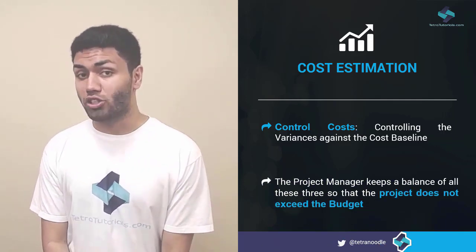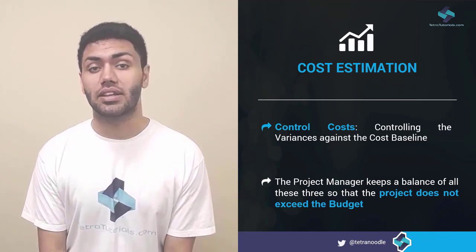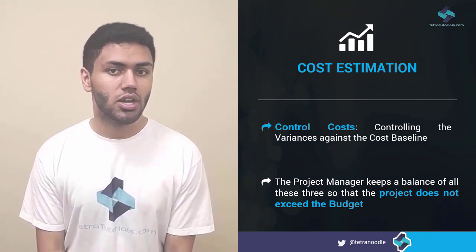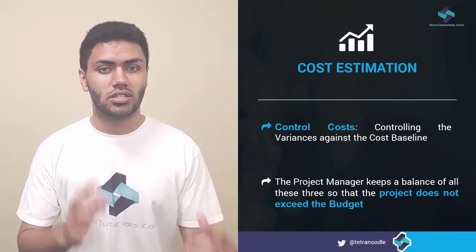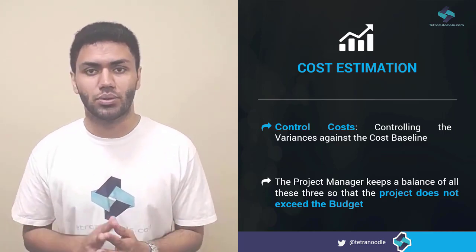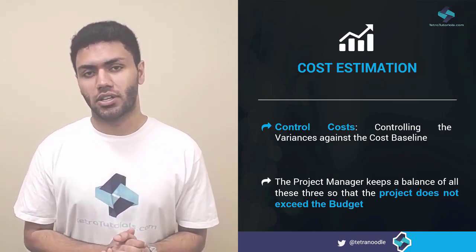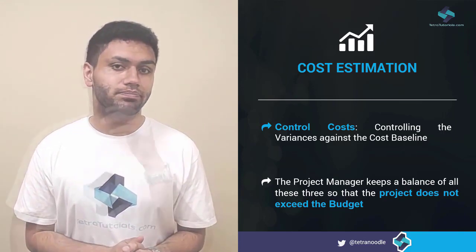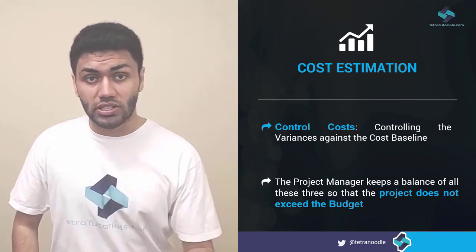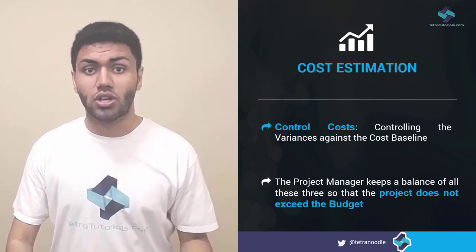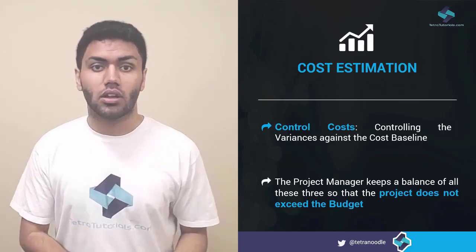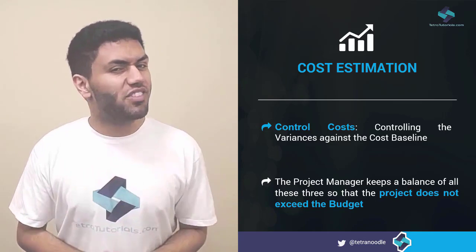Usually, the project manager estimates the cost and baselines it during the planning stage so that any increase in cost subsequently can be attributed to a specific factor in the project management. Most of the projects have an initial budget within which the project will have to be completed, and therefore the baseline is very important.